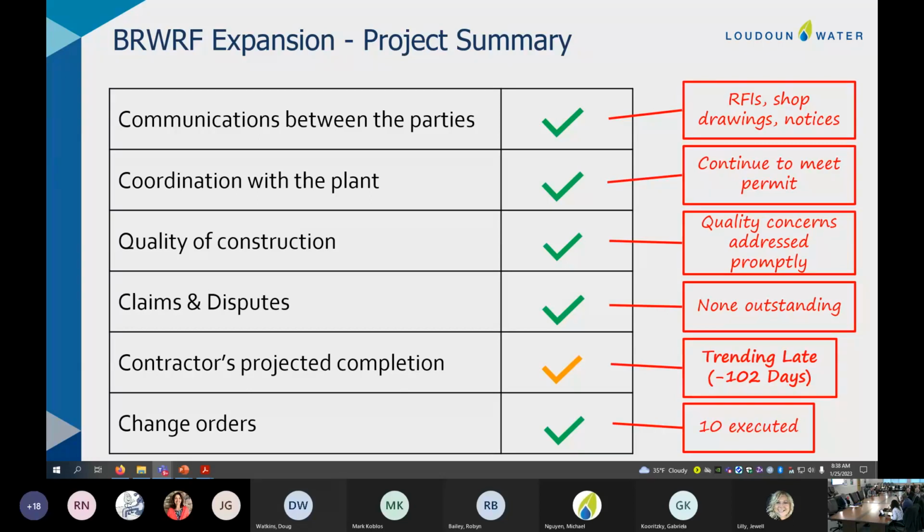I think another part of it is probably just contractor inefficiency, and that's something that we've seen on many projects in the past. But going back to the first point, the supply chain delays. We're awaiting something called a time impact analysis from the contractor, and that's basically their analysis of how the supply chain delays might have impacted the schedule.